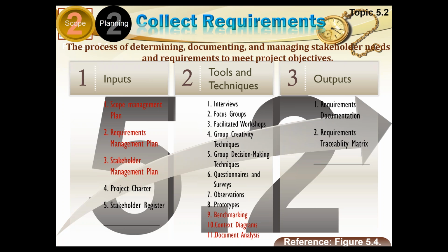Who has given this requirement? Who was the stakeholder? And what are the work packages or whatever linkages are available to fulfill this requirement, and ultimately what is the output it will produce. This is the complete chain. This is the complete trace of that requirement. So whenever there is a change in requirements, we will amend this trace.